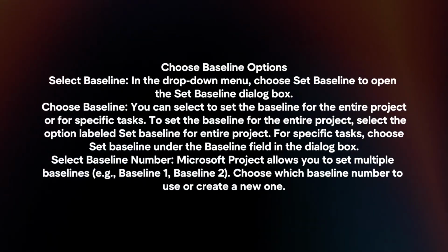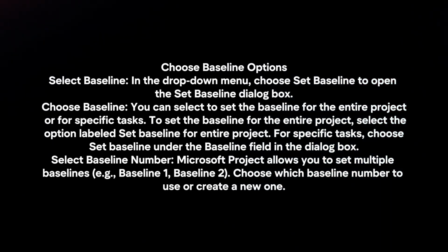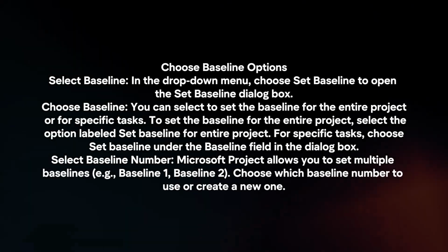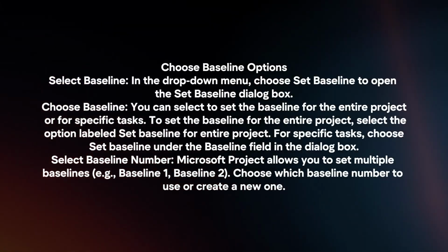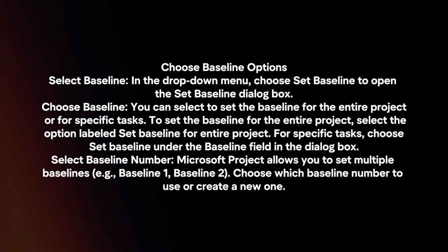Choose Baseline. You can select to set the baseline for the entire project or for specific tasks. To set the baseline for the entire project, select the option labeled Set Baseline for Entire Project. For specific tasks, choose Set Baseline under the Baseline field in the dialog box.